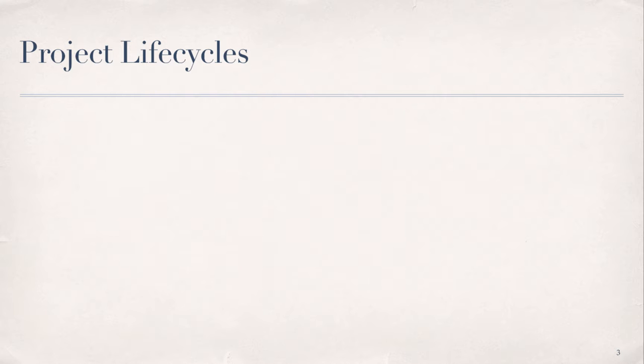We begin with a quick review of project life cycles. A project life cycle represents the series of phases that a project goes through from the start of the project to its completion. This framework applies to all projects, regardless of scope or life cycle type. Project life cycles can be predictive or adaptive. Predictive life cycles are often referred to as waterfall life cycles, as the project's scope, time, and cost are identified and fixed at the project outset. Work then moves linearly from one project phase to the next.